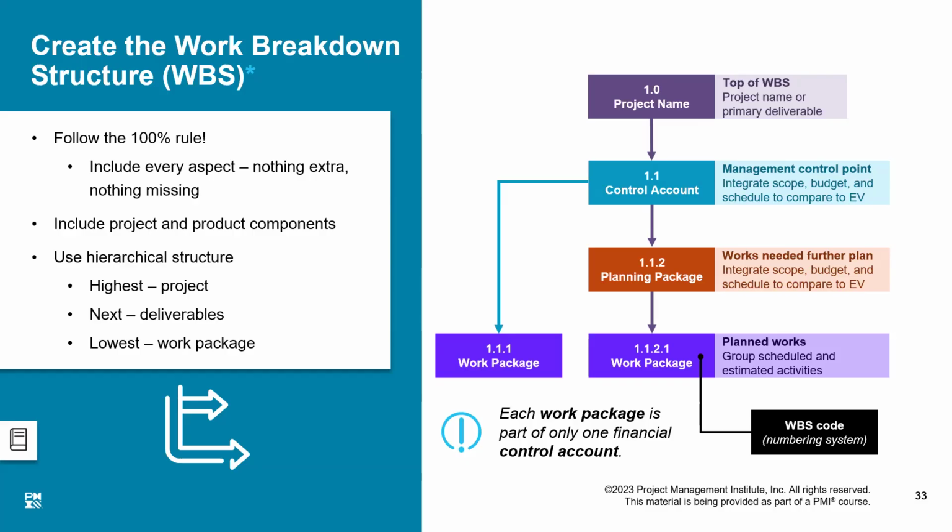How much of the wall has been constructed? Now, wall construction involves a lot of activities like bricklaying, cement preparation, plastering the wall, coloring the wall. All of this is the work package. But within that work package, we have a lot of activities.